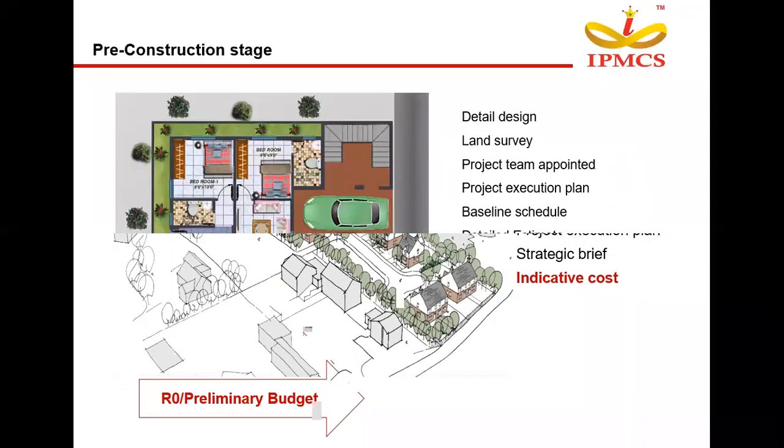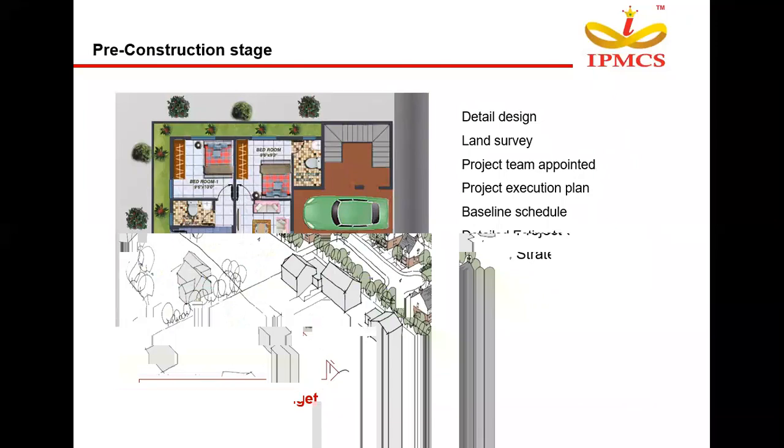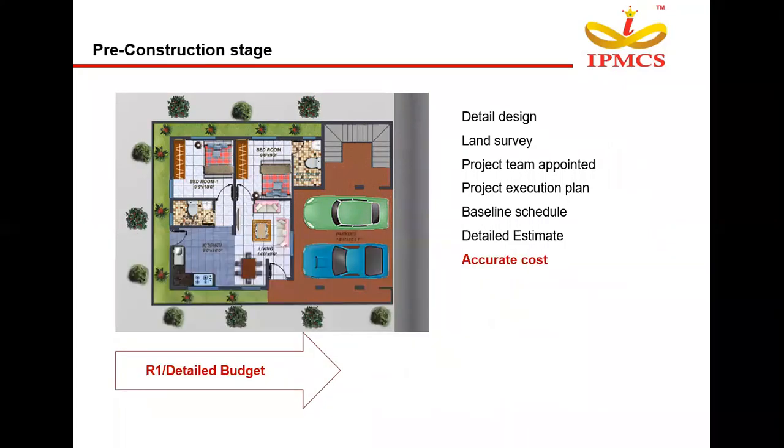And next, when we move on to the pre-construction stage, here we'll receive detailed design drawings for all the activities in our project, say like structure drawings, architecture drawings, plumbing, electrical drawings, landscape drawings, etc. With these detailed design drawings, an estimation engineer or a quantity surveyor will start calculating the quantities required for the project. Say for a footing, they'll calculate the quantity of concrete, shuttering, etc. This will be carried out for each and every activity in a project.